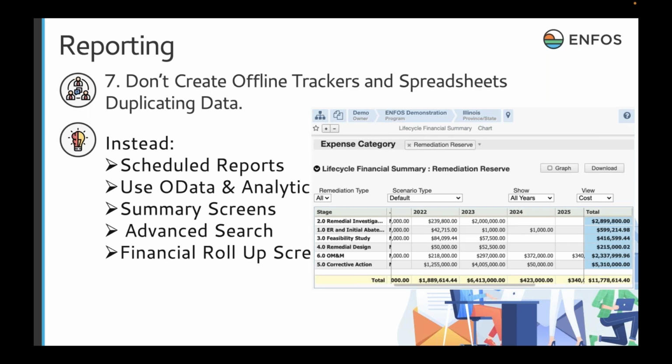I also like the cost summary by WBS report. That's a great report to know your open purchase order balance, right? And that actually will show that information by whatever work breakdown structure or WBS you're using to have that information in ENFOS. I know in that report too, the report criteria allows you to really kind of filter it down.